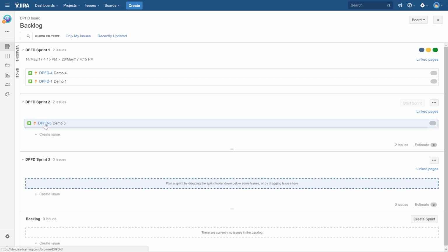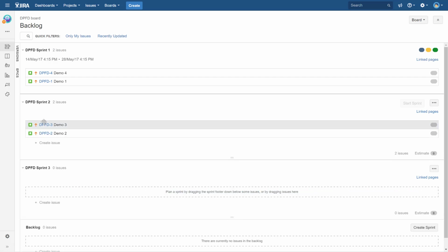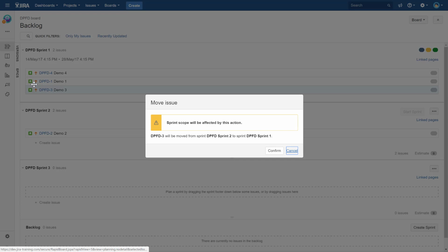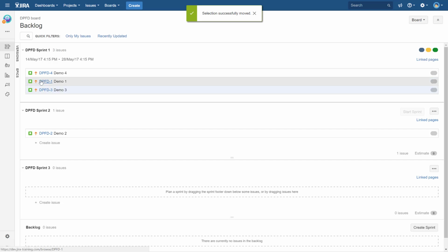And look at this. Can I put a new issue into the active sprint? What do you think? Let's do it. Well, the answer is, of course, you can. There is nothing really going to stop you, but Jira is going to warn you. If you're thinking of adding one, yes, you can do it, but it's not really recommended, because you've already planned, and just messing around is not a good idea. However, it is possible, so it's going to warn you. Same in the other way.